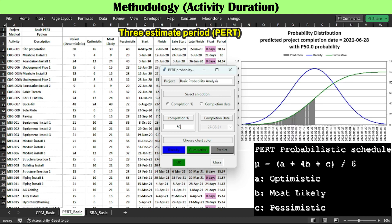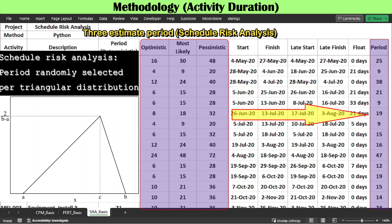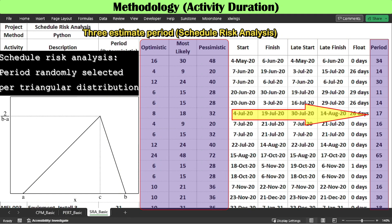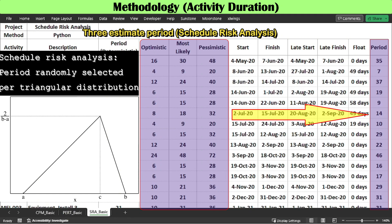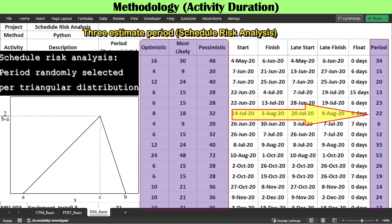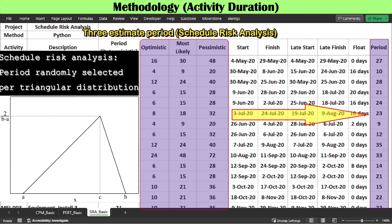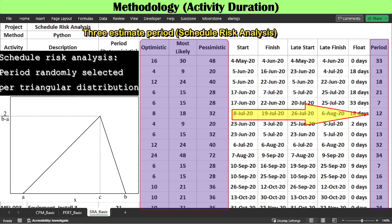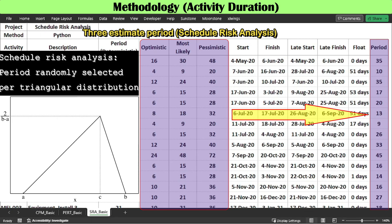In PERT, only one critical path analysis is necessary. In contrast, schedule risk analysis is required to run critical path analysis as many times as specified — for example, 2,500 times — by selecting at random a duration for each risky activity from its range and triangular distribution.